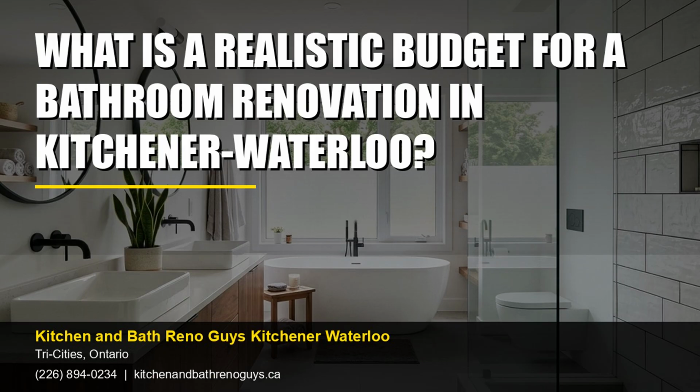Consider the age and condition of your home's plumbing and electrical systems when budgeting. Plan for a contingency fund of at least 10 to 15% to cover unexpected expenses, especially in older homes. Focus on essential updates first and then consider aesthetic improvements. Check for any local permits or heritage restrictions that might affect your renovation plans.